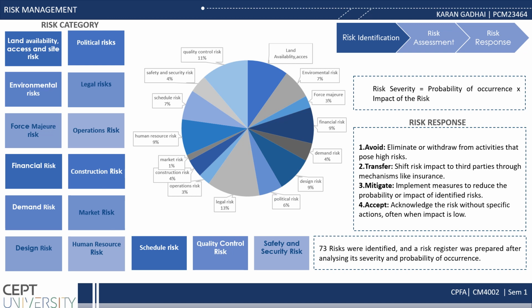So the risk could be an opportunity or a threat. If the risk is identified as a threat, then it should be avoided, transferred, mitigated, and the last option is accept. If the risk is an opportunity, then the risk should be enhanced or exploited.